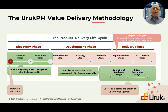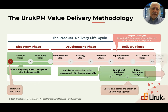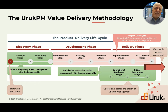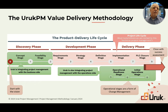Next, we define the project classification: size, complexity, and degree of innovation. Rook currently uses four classes: micro project, small/simple project, medium/moderate complexity, and large complex. In the future, we'll add a fifth — mega project. These classifications must be tailored to your organization. In oil and gas, a micro project could be $2 million, while in technology, a $2 million project could be large and complex.